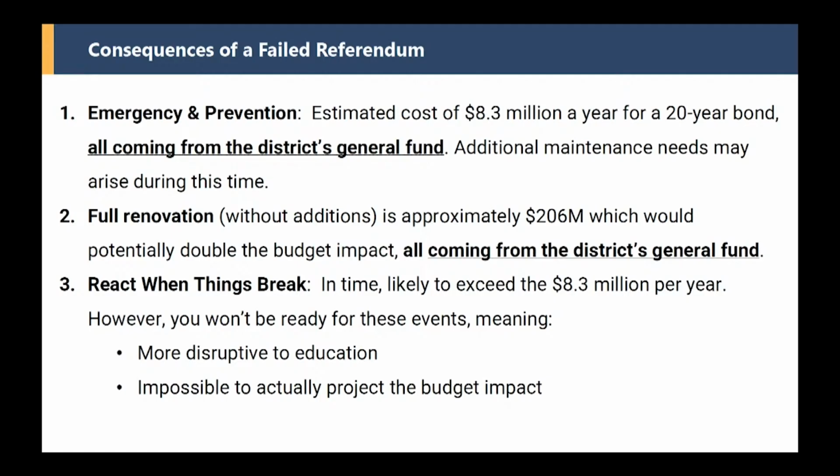So, and that would be full year, like 12 months of 3 to 4 years of active work? Yes. All through school, repairs, everything. That's why the modulars need to be there. There's no way to break this up into just summer only work. You would certainly have to have a modular farm, and you'd have to be shifting kids throughout those modular classrooms as you worked your way through segments of the building. Okay.